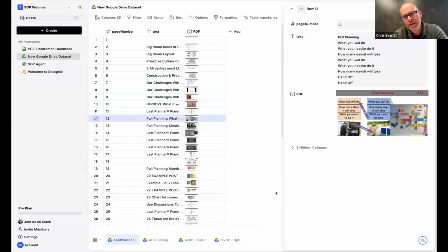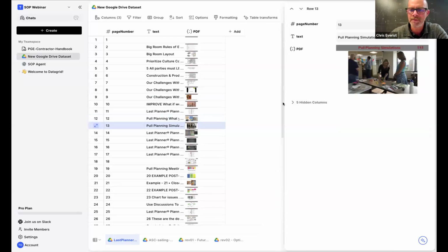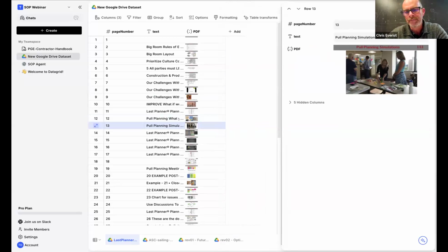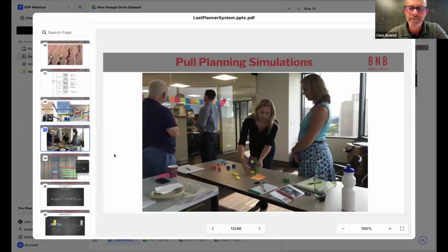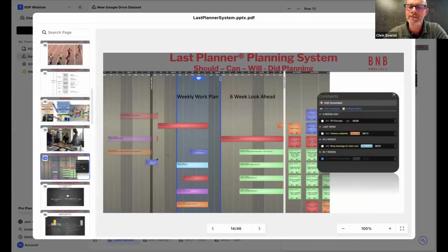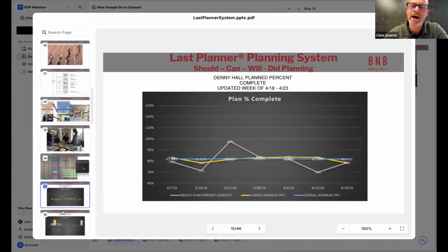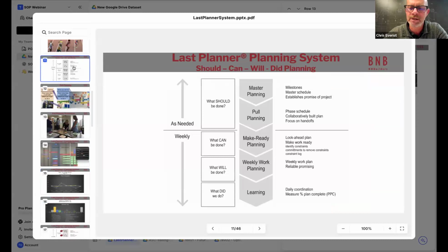A construction team starts by identifying milestones. Then, pulling back from those milestones, we agree how we reach each milestone in a process called pull planning that I'm sure many of us are familiar with. A lot of teams stop there, but those who are adept in the complete process know that the next step is having a discussion on a weekly basis about what we can do.